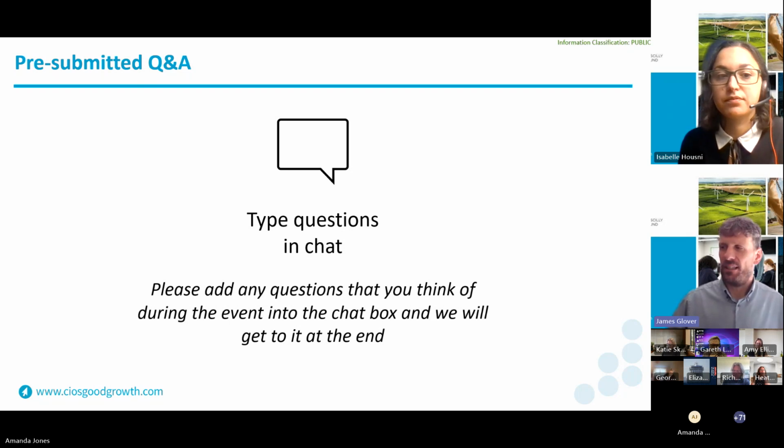Defrayment can happen after this date, but prompt payment must happen as the deadline for claims cannot be extended. The final claim must be submitted by the 30th of April 2025 to us at Cornwall Council. Thank you. And last question from the pre-submitted ones.